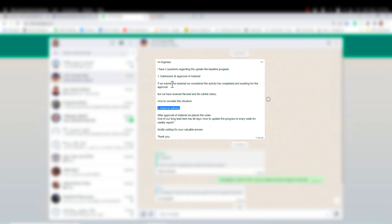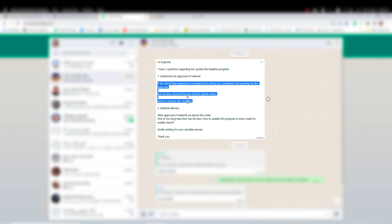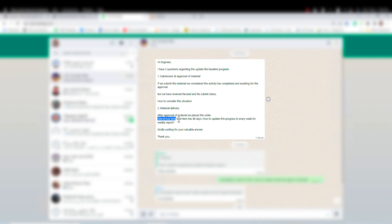I decided to record a video showing how I answered this question. The first part is asking: if we submit the material we consider the activity has completed and waiting for approval, but we received a 'revise and resubmit' status — how to consider the situation? The second part is asking: after approval of material we placed the order, one of our long lead items has 86 days — how to update this progress every week for the weekly report?